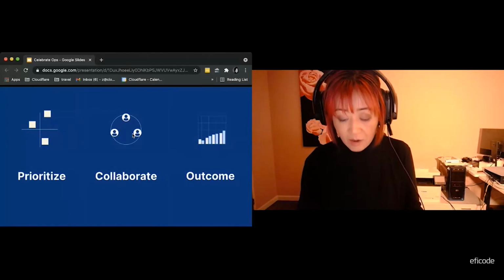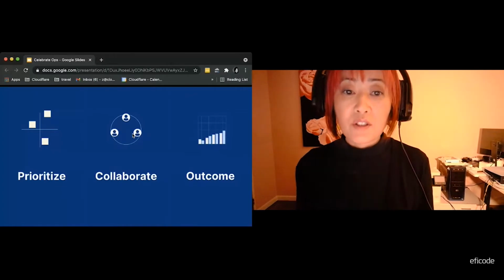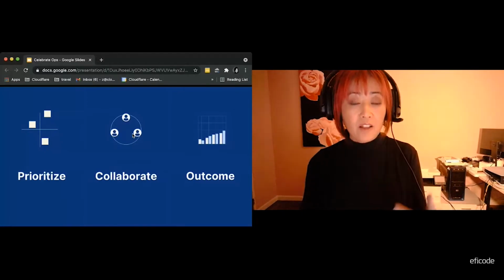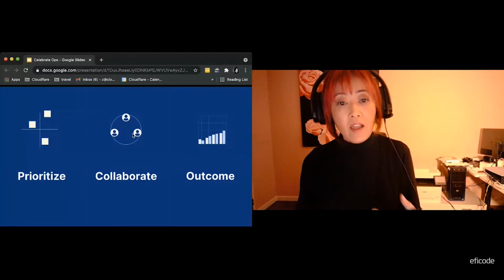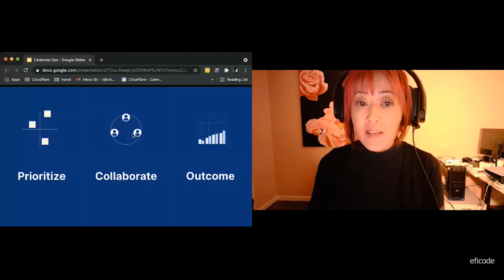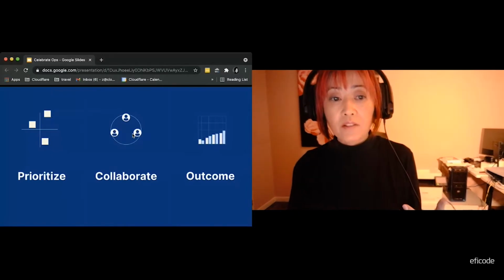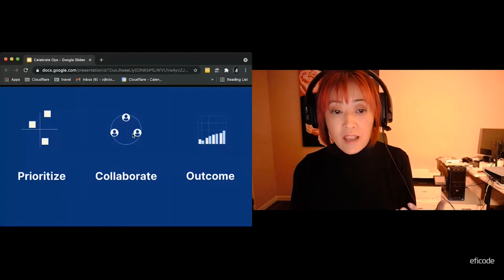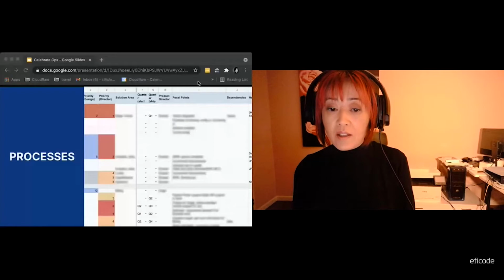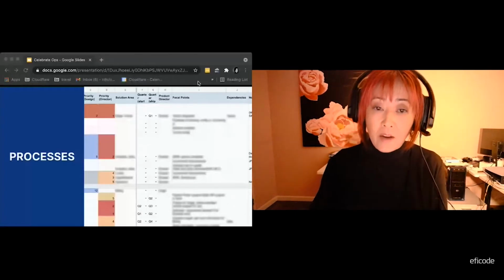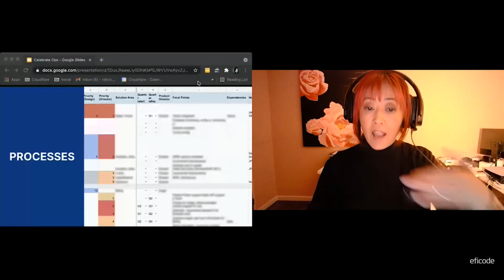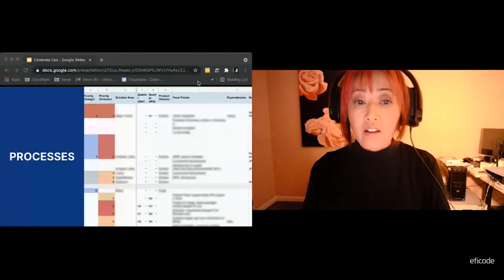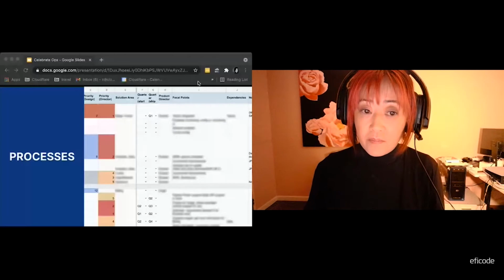What we did is that our team, the first thing we do is to reach out to our business partners. We talk to all the product directors about their products, and then we stack rank all these products based on the business priority. Business's language is money. It is really the business value of the design, right? So we ask our product delivery partners and directors to help us stack rank it. If it's highly prioritized, then we can support that product. If it doesn't match this priority, it gets put into the backlog.